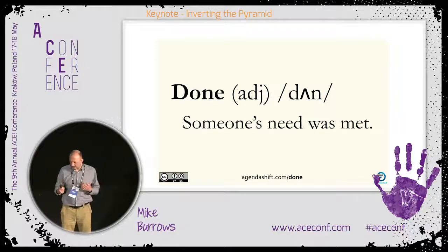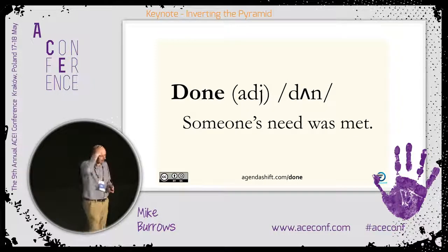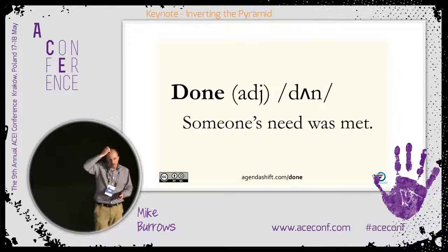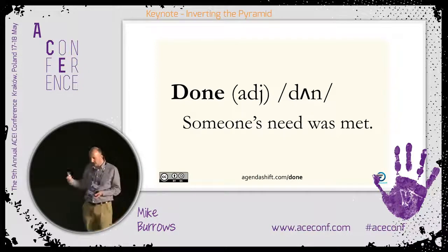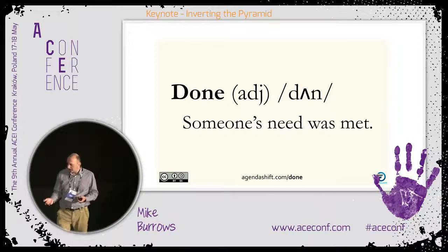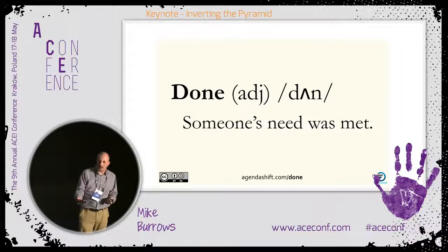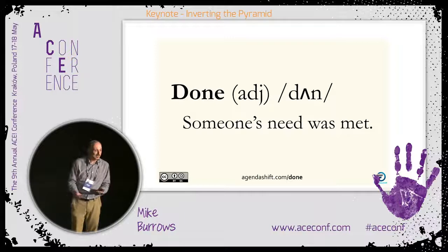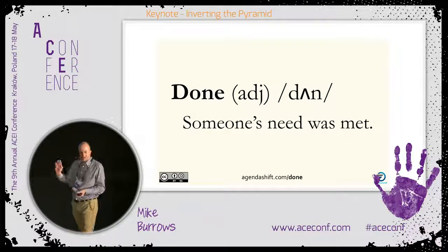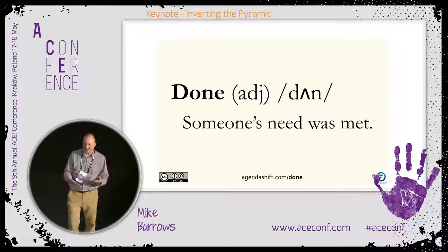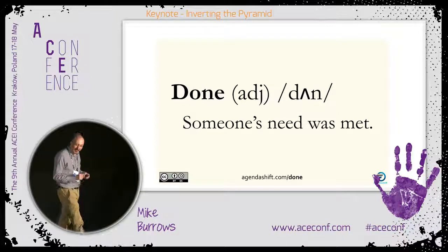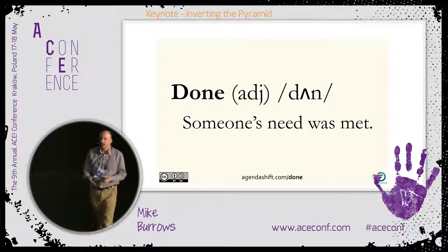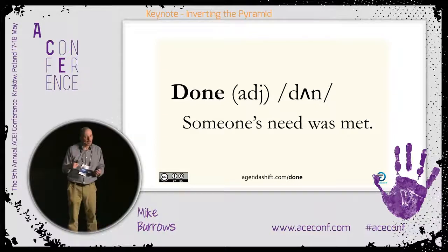In my first book, I described a situation where I was so sick of delivering features that nobody used. I said, right, at the end of each piece of work, there's going to be a conversation between the customer and the developer in which the customer is going to confirm to the developer that, yes, this is meeting my needs and already delivering value. I was angry when I implemented this. What I didn't realize, I just discovered validation. And it had a profound impact on the way the whole process worked.